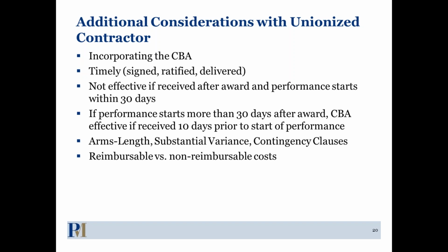And if you don't do that, there are some negative consequences, including that the CO might not accept the CBA and might not actually incorporate it into the contract. Because we said that it is automatically incorporated, but that's only if you get it timely submitted. And if you don't submit it on time, it doesn't mean that you don't have to abide by the CBA. You still have an agreement with your employees to pay them the certain wages and give them the certain fringe, but it doesn't mean that the government has to reimburse you for those costs. So it's really important that you get things in on time.